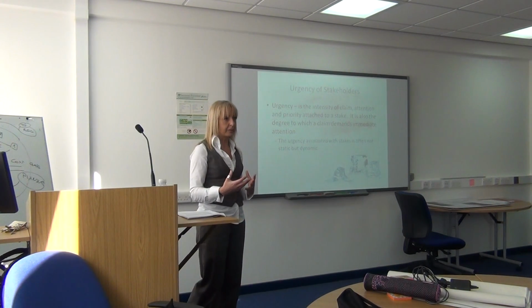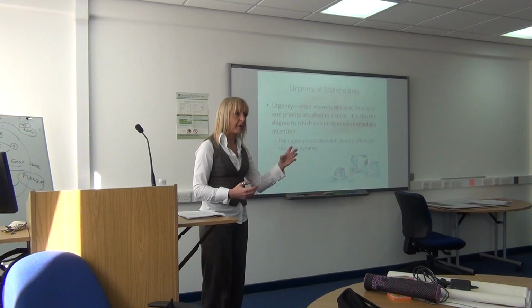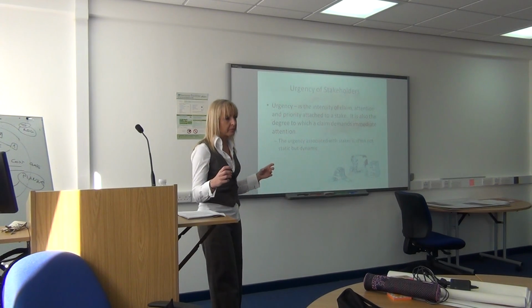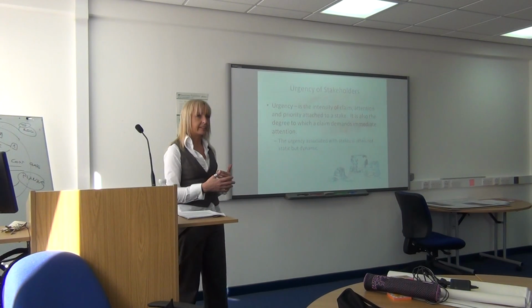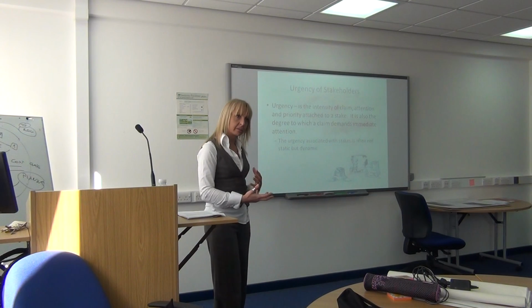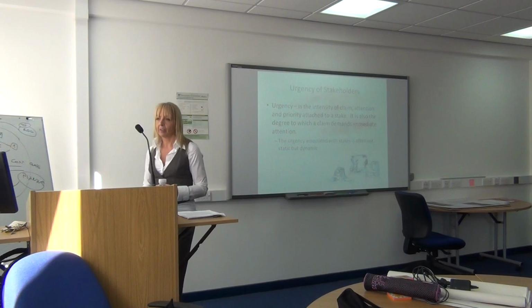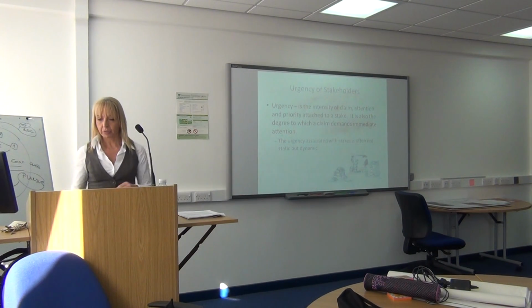Of mapping stakeholders and monitoring them, because the power that people have at one point of the project may not be the power that they have at another point of the project, and that's where this constant monitoring and evaluation of who they are, what they want, and their urgency and legitimacy in the project will change. So again, we'll touch on that towards the end.